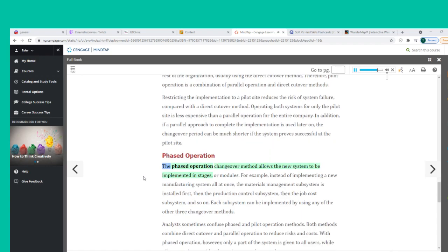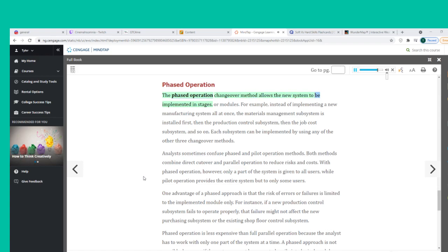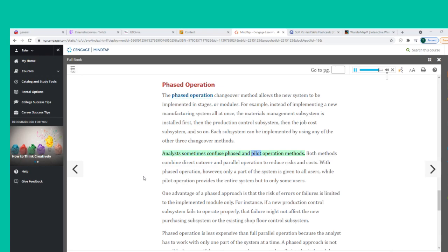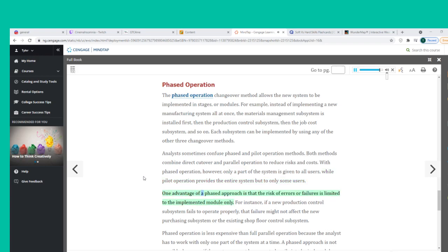The phased operation changeover method allows a new system to be implemented in stages or modules. For example, instead of implementing a new manufacturing system all at once, the materials management subsystem is installed first, then production control, then job cost, and so on. Each subsystem can be implemented using any of the other three changeover methods. Analysts sometimes confuse phased and pilot operation — both combine direct cutover and parallel operation to reduce risks and costs. With phased operation, only a part of the system is given to all users, while pilot operation provides the entire system to only some users.